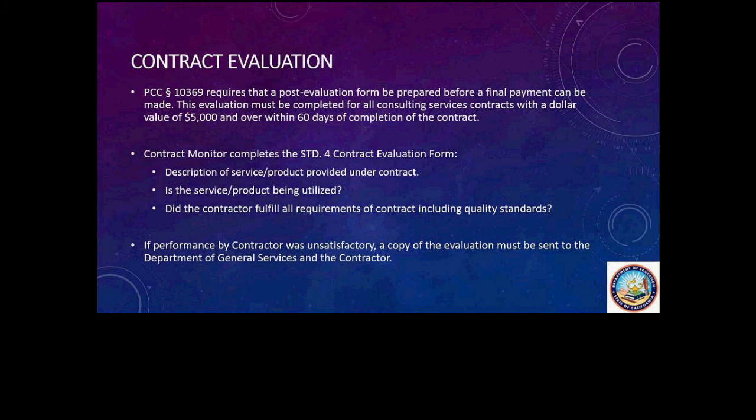Contract evaluation. So the final report at the end of the contract period is the contract evaluation. The form must be completed for all consulting services contracts with a dollar value of $5,000 or more within 60 days of completion of the contract.